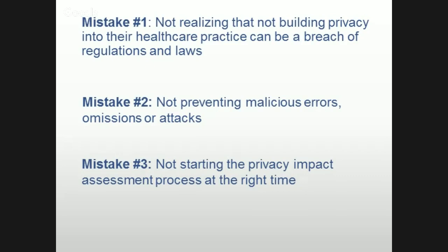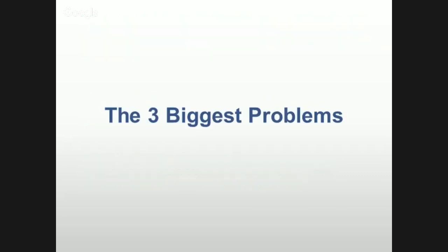Or maybe they get to the PIA process and they realize that it's a valuable thing to do, but they can't get it done in time for their go-live date, so they need to adjust the go-live date. So finding the right time to do your privacy impact assessment, and sooner is better, is a mistake that I often see people make about doing privacy impact assessments.